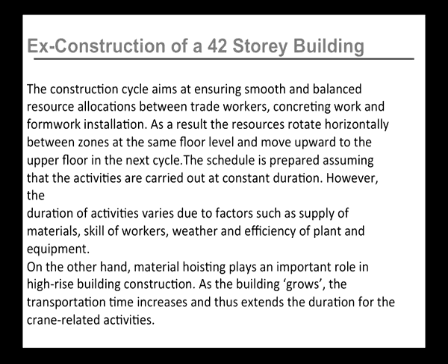The schedule is prepared assuming that the activities are carried out at a constant duration. However, the duration of activities varies due to factors such as supply of materials, skill of workers, weather and efficiency of plant and equipment. So, what happens in a construction cycle?